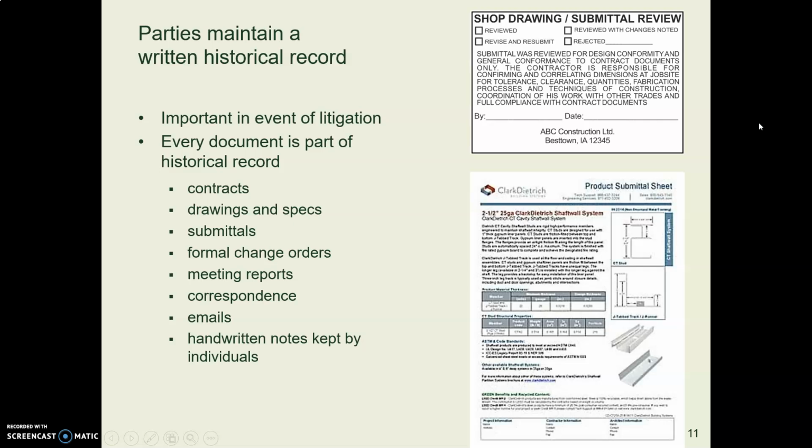Now, what you need to know is that written records are extremely important, and you and everybody on your team need to document everything that happens in writing. So, for example, if you have a conversation with a vendor and you, and by you I mean the people in the conversation, reach an agreement about what you're going to do, you document that phone call in a written record which you send to them and you ask their agreement. Even handwritten notes get saved.